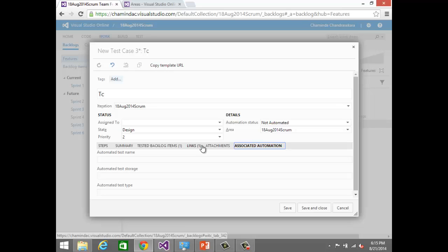So remember that bug, user story, requirement and change request and all those things in TFS are treated at the same level, right? So the next level is test cases, which are explaining all of those things. So a test case may be testing a bug, a test case may be testing a user story, a test case may be testing a requirement, right? So a test case is at that level. It is for the purpose of testing a particular thing that we are doing, right?